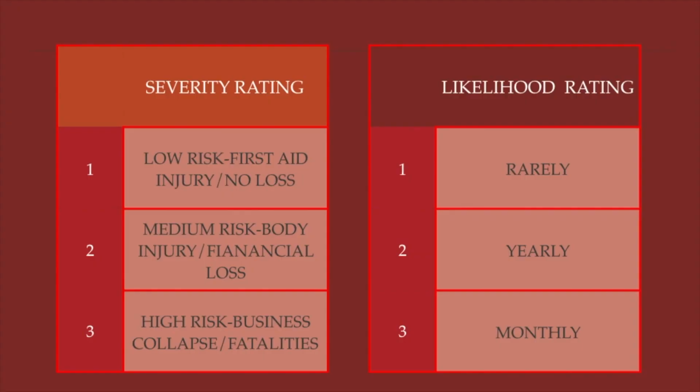After this risk register, we have to plot this risk matrix with 2 axes, horizontal and vertical, for each one of them. Before that, we need to give a rating of 1, 2, 3. If you have to draw a 3 by 3 square matrix, you can also do 5 by 5 or 9 by 9. We will see now the matrix, how we have to design.